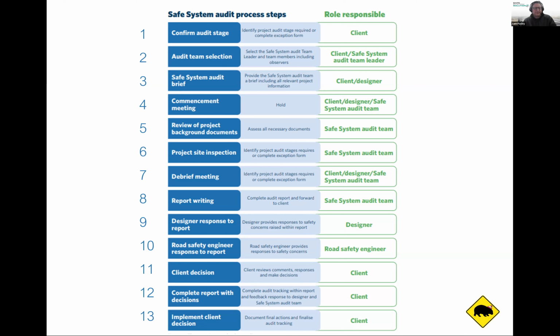Right. Then Matt's question is, the decisions get completed, the report hopefully should get circulated back to you so you can continue that learning and understanding of how the clients have come to their decisions. So for new reports, it gets circulated around the parties. And then the client implements the decision. That might be, as part of that, they've told the designer to make a change or not.